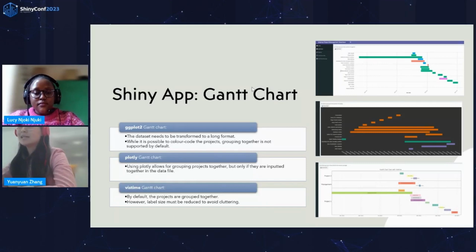And the last Gantt chart is using the package timevis. timevis is a quite well-known package which can produce interactive timeline plots with the timevis function. And one point that needs to be noticed is the data frame you use must contain the event and start columns. If your columns are named otherwise, you will need to tell the function.